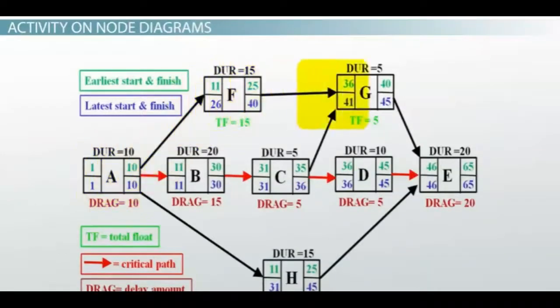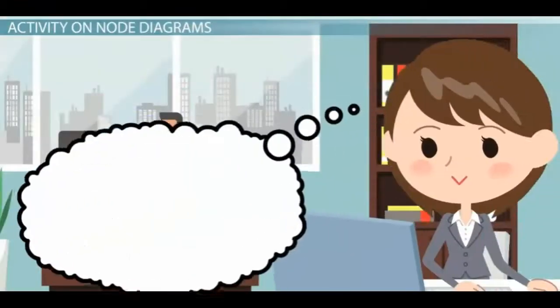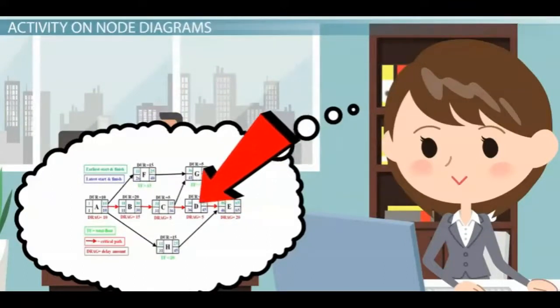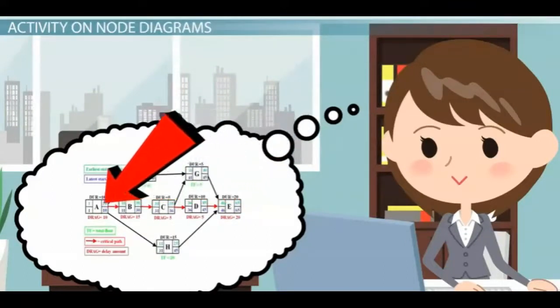As you analyze each path moving forward through the AON diagram, you can add information in each box that indicates the earliest an activity can start and the earliest it will finish. Again, the longest path through the network diagram will be the critical path. With the AON diagram and the results of the critical path, you can analyze each path through the project working backward from the critical path finish.